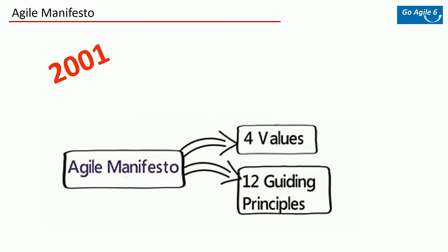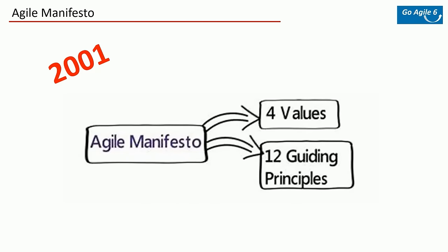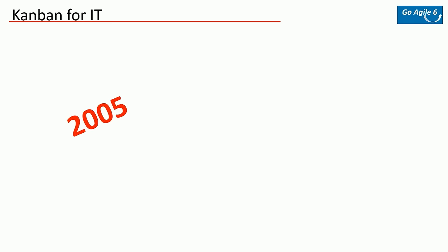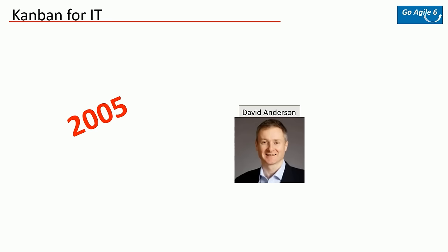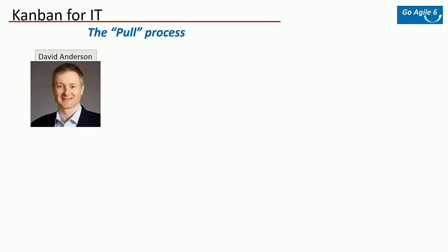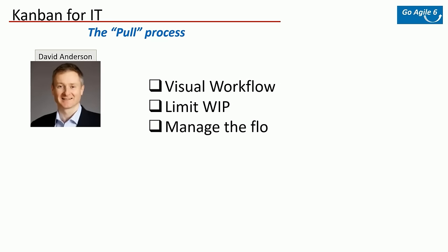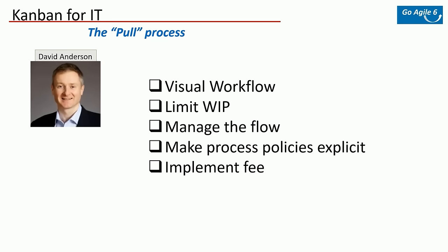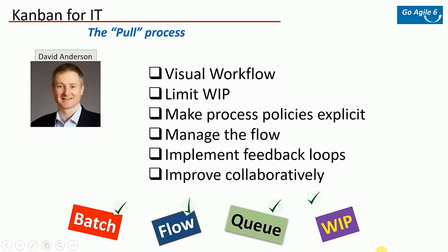Around 2005, David Anderson took Toyota's production system and started applying it in the IT process, coming up with Kanban for IT. He called it the pull process. He came up with six principles for Kanban in IT: visual workflow, limit work in progress, managing the flow, make the process policies explicit, implement feedback loops, and improve collaboratively.